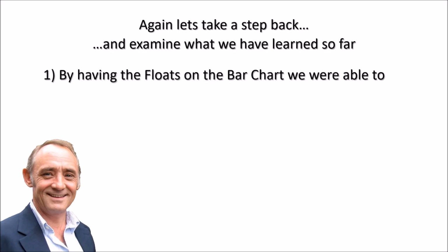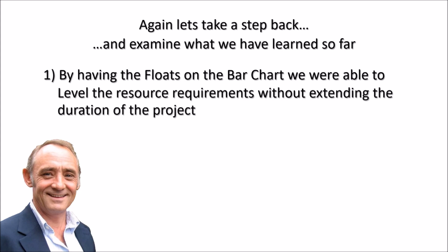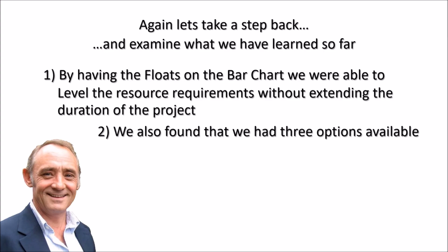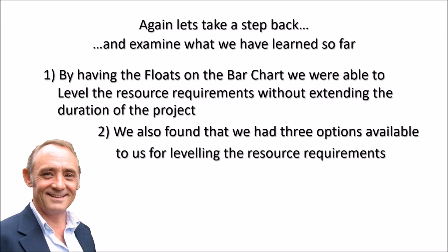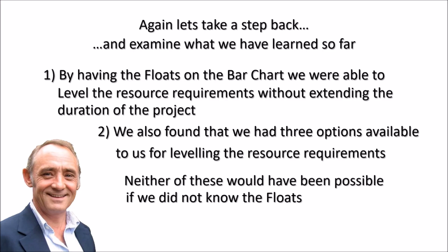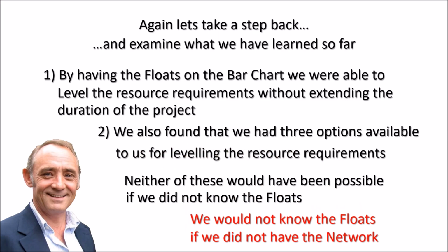By having the floats on the bar chart, we were able to level the resource requirements without extending the duration of the project. We also found that we had 3 options available to us for leveling the resource requirements. Neither of these would have been possible if we did not know the floats. We would not know the floats if we did not have the network.